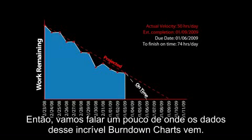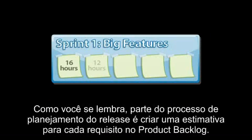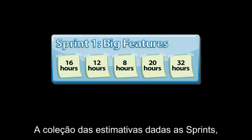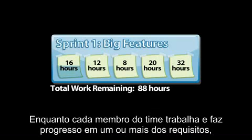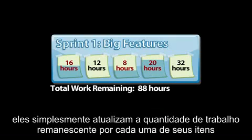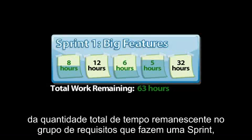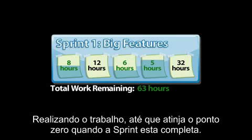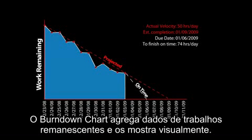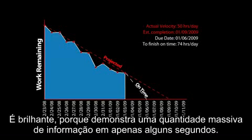So let's talk about where the data for this incredibly useful burndown chart comes from. As you recall, part of the release planning process was to create an estimate for each feature in the product backlog. The collection of these estimates for a given sprint represents the total amount of work that must be done to complete that sprint. As each team member makes progress on one or more features, they simply update the amount of time remaining for each of their own items. So the total amount of time remaining changes on a day-by-day basis, hopefully going downward until it hits zero when the sprint is complete. The burndown chart aggregates the remaining work data and shows it visually — it's brilliant because it communicates a massive amount of information in just a few seconds.